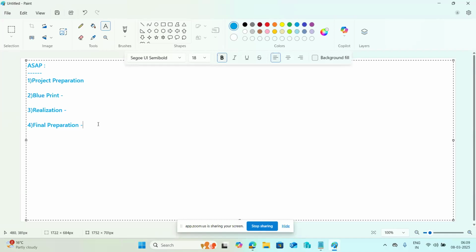Why? Because in final preparation, if you miss anything, any bugs, we will fix them here. Then come final testing, cutover and data cutover preparation, and end user training for those who will use the production system, including giving them training and creating system IDs. Also the system support organization is put in place: technical help desk, support teams, and operations for the production environment, along with organizational challenges and go/no-go decisions. All of these things are done in the final preparation phase, right?